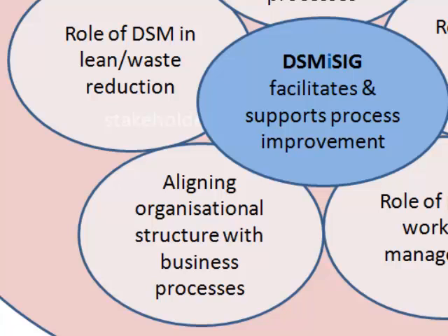The DSM charts clearly show blocks of highly interdependent activity, where physical or virtual co-location of involved team members is conducive to resolving the complex situation at hand. The phase or handoff reviews should be positioned between these blocks wherever it is possible.